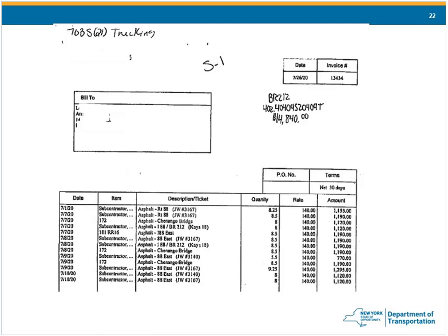And I got another comment back here on the trucking, which is one of my least favorite topics to ever have to discuss. Don't forget, when I said that approved subcontractors for trucking need to be represented as subcontractors, not as services, you also still have to make the differentiation between on-site trucking and off-site delivery.